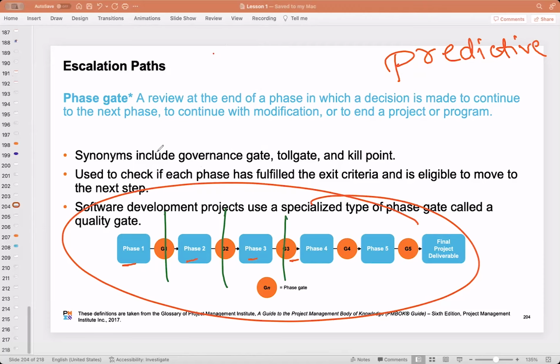In a whole big project, we would have identified that we are going to do 1,200 deliverables in the WBS. Okay, but at the gate one, please listen here. At the gate one, we would have identified that from this 1,200, let's say 250 deliverables we are going to do. And then that we will commit to the senior leadership team, and we will fix a timeline for that.